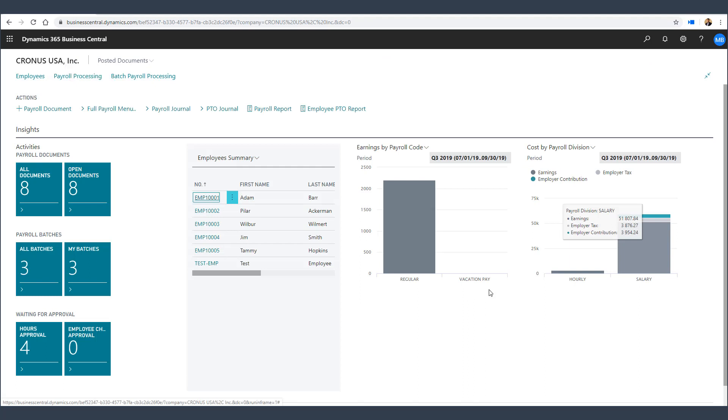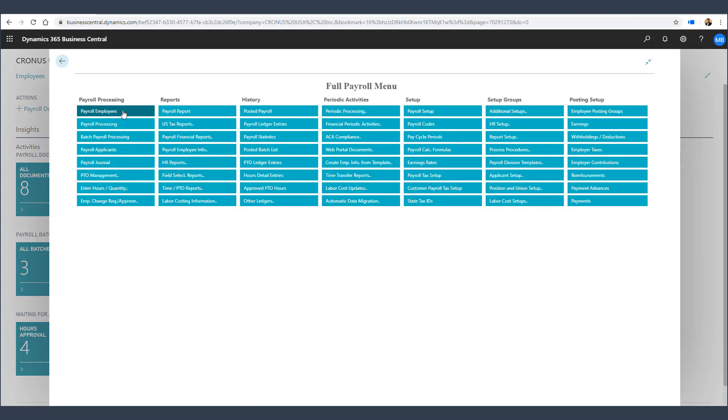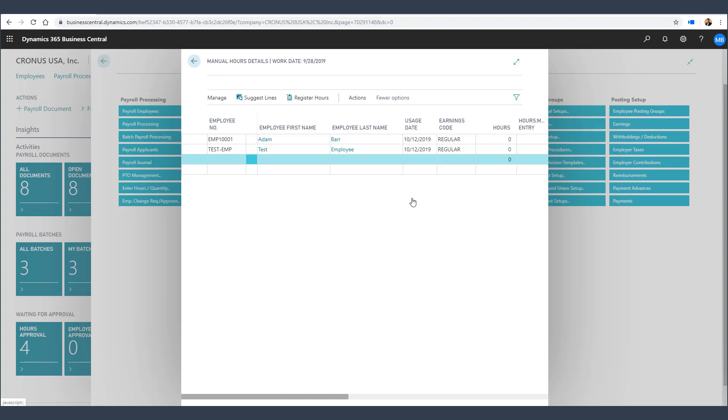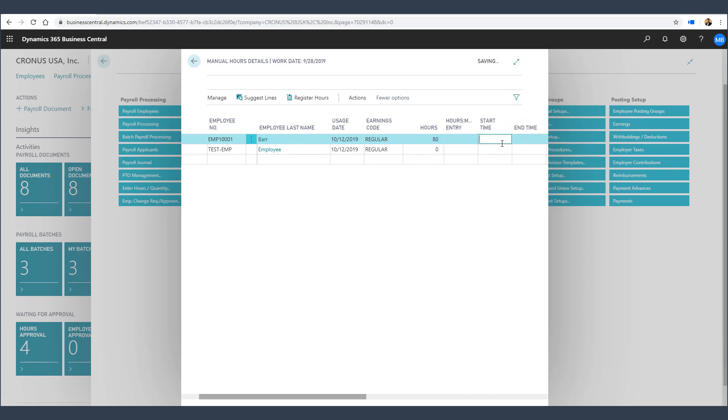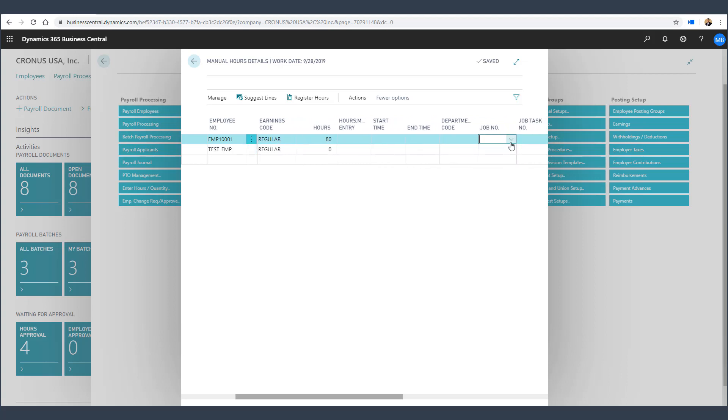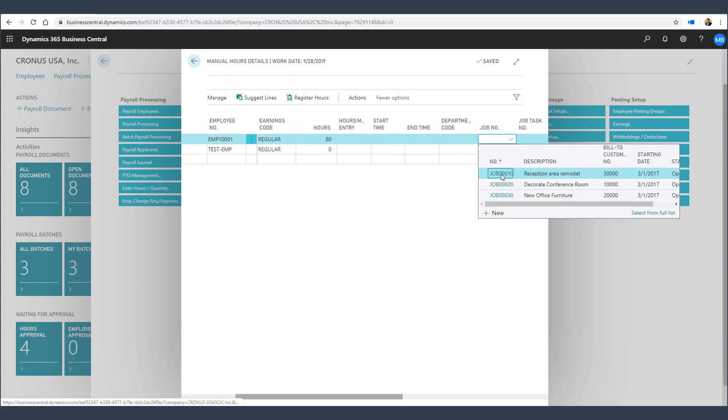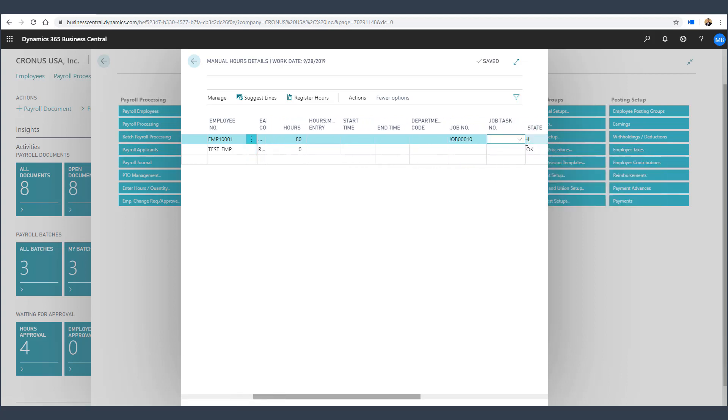Let's look at how time is tracked for employees and then associated with the jobs that are set up within Business Central. There are two ways to do this using Payroll Now by Integrity Data within Business Central. First, if we're entering the time within Payroll Now by Integrity Data, let's create some timesheet records for these employees. As we look at Adam Barr, we can enter the hours for Adam Barr and assign them to a job number and task within the payroll time entry.